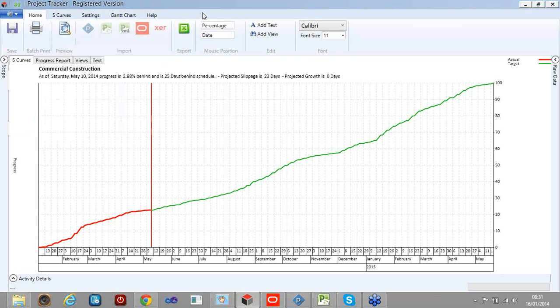There's some fairly clever work that goes on in calculating the curve, in that it's unlikely to happen in Primavera, but can happen in Microsoft Project and ASTA, that there could be uncompleted work prior to the data date because the user hasn't rescheduled or recalculated the project. So what I do there, I calculate the amount of uncompleted work that's been done and spread it over the remaining period to make sure that the curve meets at the correct point, which is something you can't do in Excel.